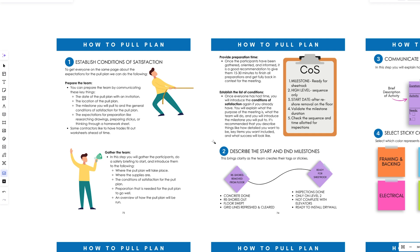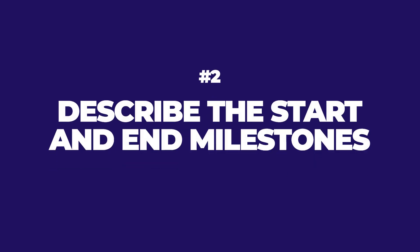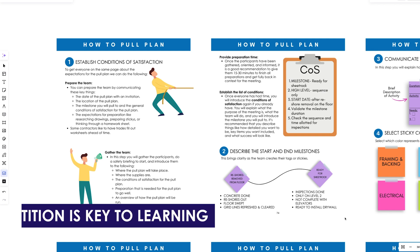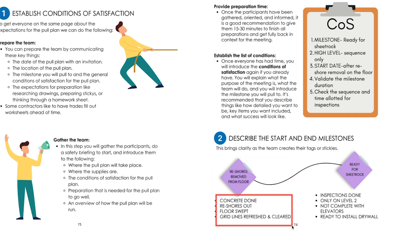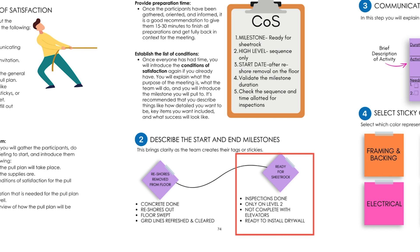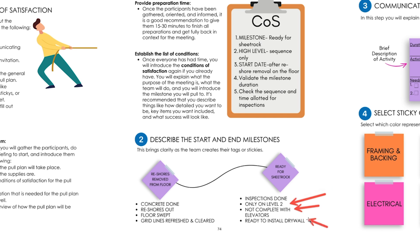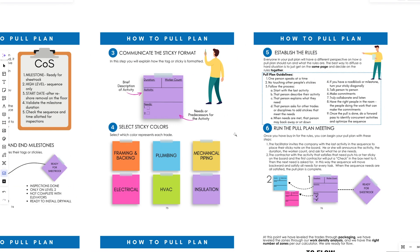When we start the actual pull plan, one of the first things I do is describe the start and end milestones. Repetition is key to learning. For example, the start milestone might be: concrete's done, reshores are out, floor swept, grid lines refreshed. The end milestone — 'ready for sheetrock' — means inspections are done, we're only on level two, and we're ready to install drywall.